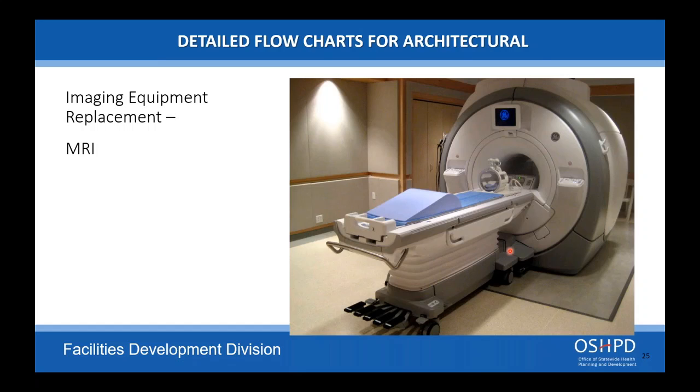That's required for the equipment replacement. But if you have to remove the walls to relocate them to get the clearances required, that is no longer an image equipment replacement only. That's considered an alteration and would need to be brought up to current code. Same with the slab. If you have to demo the slab to do this and put a new slab in, that goes beyond the image equipment replacement requirements.